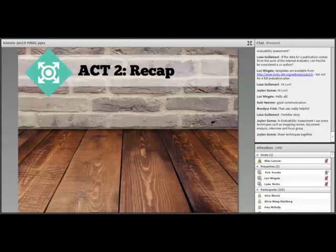All right. So let's recap Act 2, the creep. Number one, it's important to note here, and this comes out of a couple of real-world examples that I have seen with clients for some of the reasons that Lori did a good job of explaining. This risked some changes turning into real scope creep, where the work grows beyond what could be afforded under the original budget. There were completely legitimate reasons for changing the data collection strategy, even though it was initiated by the client, and even though it increased the cost of getting the data from the students.